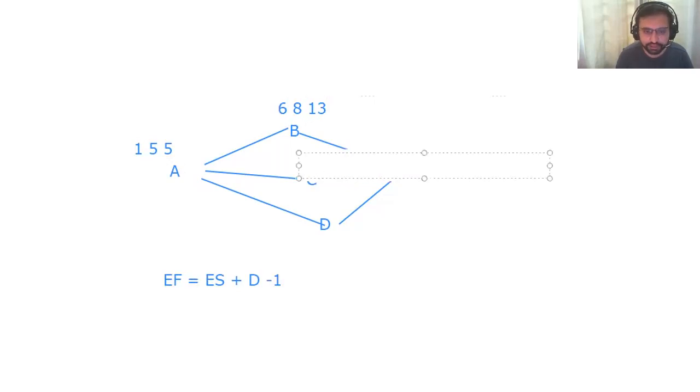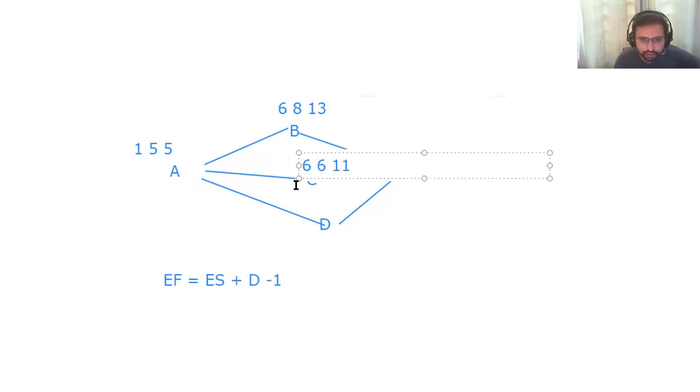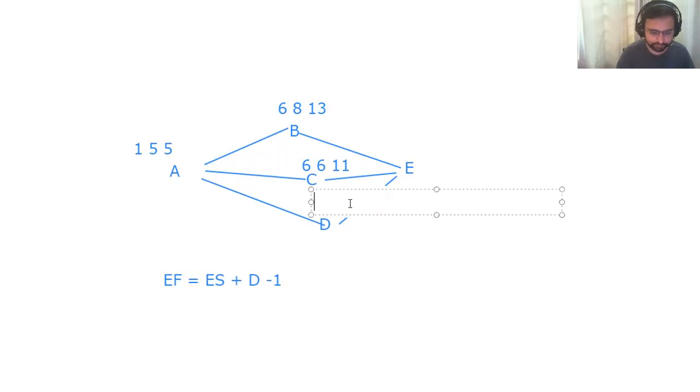The duration of C is six. Six plus six, 12 minus one, 11 maybe. Then the duration of D is seven. Six plus seven, 13 minus one, 12.